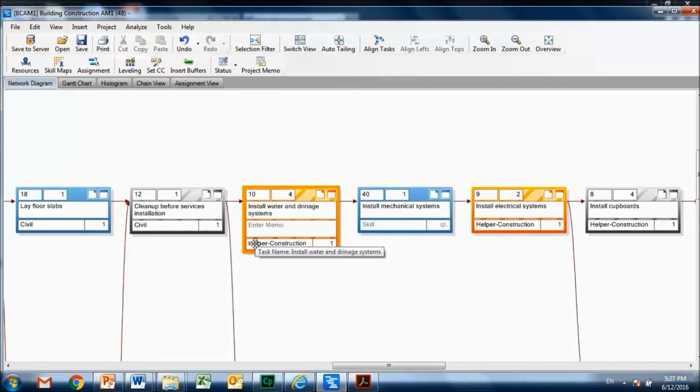So here is my block that will be performed by constrained resources, and if I have multiple projects, I will figure out a way to stagger those projects so that the resources that are used for these 3 tasks will be staggered across projects, so that they will not be loaded for more than one project at a given point of time. That's what we accomplish by setting integration points.